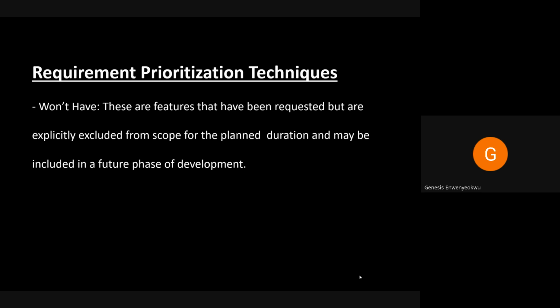right? Even in the shortest time frame, there's no immediate value. Because of that, we don't implement those features. We consider them to be won't have. That doesn't mean that a year from today or 2 years from today, those features will not become a must-have priority anymore. But for the moment, we consider them as a won't have because there is no immediate business benefit or there's no looming penalty or risks for us to take.